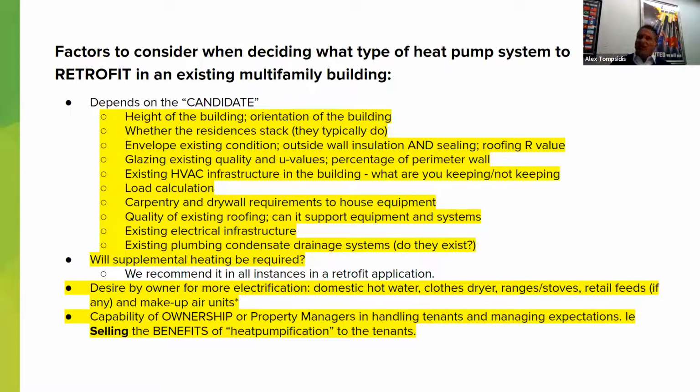And we have to have all the equipment on the roof with whatever roof support. It's got to be there. The electrical all needs to be pre-piped. And then we're going to come in and tear out whatever, or put in brand new, the furnaces or other devices. And really all that has to happen in 2 days, because remember, these are occupied units. And then, these aren't in any particular order.